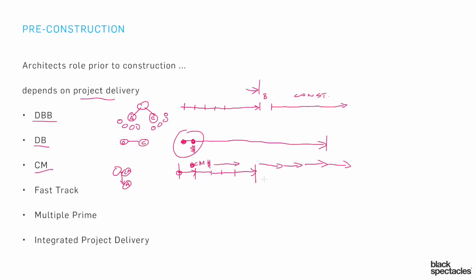Other delivery methods — Fast Track, Multiple Prime, Integrated Project Delivery — each impact the architect's role in their own ways. In all of them, the core role is to help make sure the project gets built correctly and to keep everybody informed. The specific tasks like RFIs and field communications remain the same regardless of delivery method, but how they play out contractually and who receives that information will change for each project delivery system.